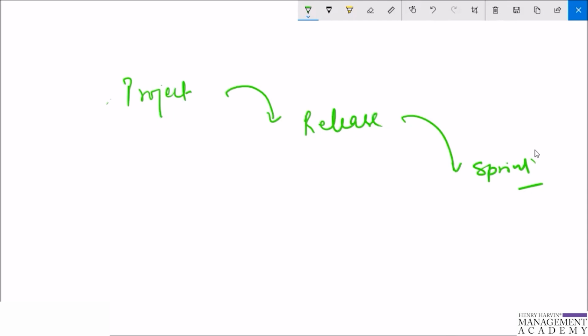functional point analysis, or maybe a story point analysis in that sense, at the initial phase of the project development. So when we do a release level, it includes assigning story points to the user stories that can help in defining the order of user stories based on priority, and can also help in deciding which stories can be taken in the current release and which can be taken into the later release.